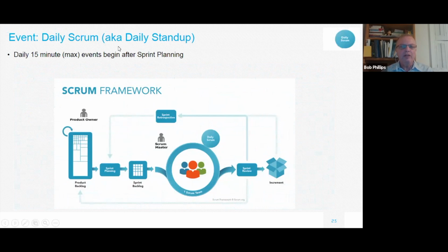During this meeting, the team does planning. The reason they say daily doesn't mean Monday and Friday or Monday, Wednesday, Friday. It means every day. I've heard of teams taking longer than 15 minutes. There is no reason that if you have eight developers, you cannot complete this meeting in under 15 minutes, because it's a planning event just for the developers. This is where we are in the diagram, looking at the daily Scrum.